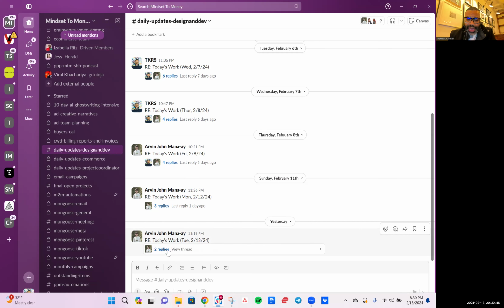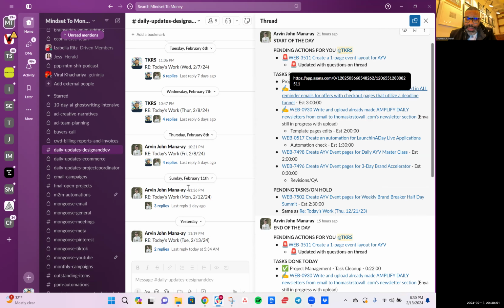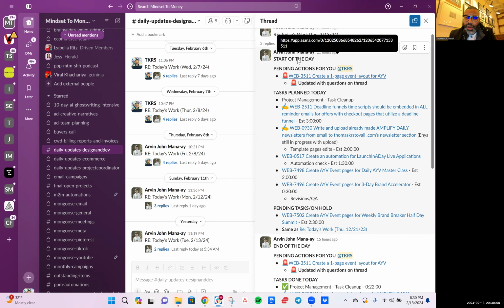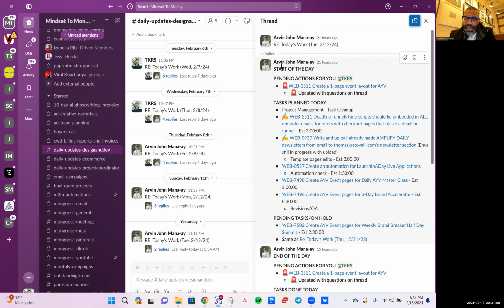there's going to be a Slack thread for that particular day. If I click in it, and the next thread for tomorrow will be created sometime in the next couple of hours, I'll be able to see what they're going to do. Arvin starts the day off by saying, start of the day, here are the pending actions that I need to look at. Here are his tasks that are planned for the day. These are direct links to these projects in Asana with an estimated time of how many hours that he plans on these things taking during the day.